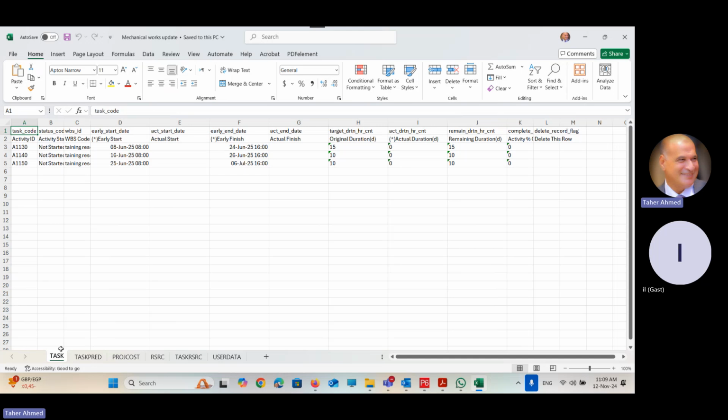I am the mechanical engineer. You told me that this activity will start on the 8th of June. I will, yes, Control C. It started on the 8th of June. Control V. Yes, it is the same date. It is not finished yet. The original duration is 15, but the actual is 5. The remaining is 10. And it is 35%.